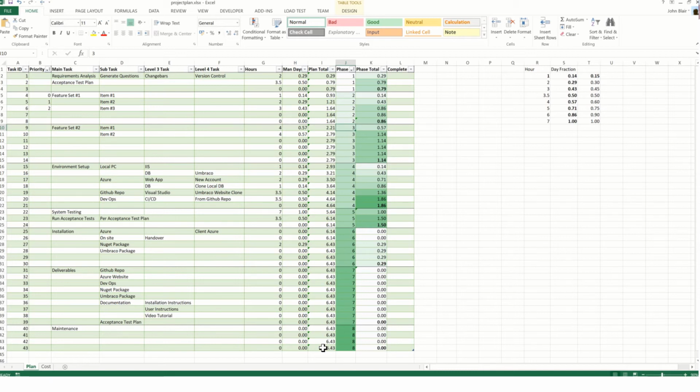If it's a large enough project, I'll save a version of this project plan on a weekly basis, just for audit purposes, and it helps for any post-project analysis of underruns, overruns, etc.